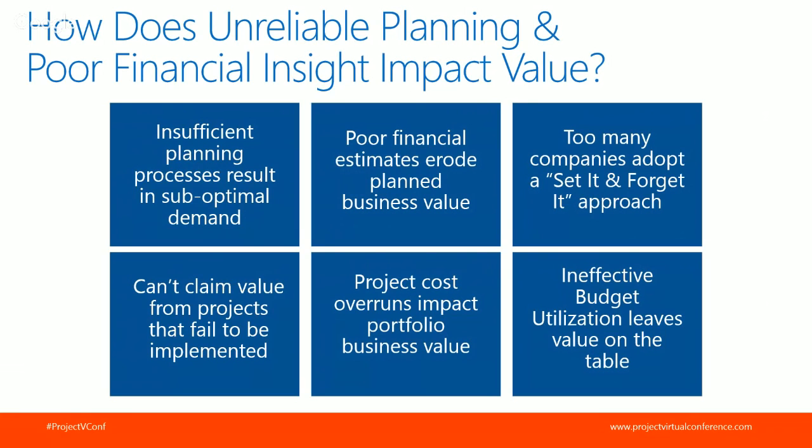One of the surprising things we found when conducting this research around the 46% was the impact of budget utilization. We found that many organizations today weren't able to spend all their budget during the given fiscal year. Could be for a variety of reasons. Resource shortfalls, simply meaning projects weren't kicked off when they were supposed to be, unplanned carryovers, projects that unexpectedly slip from one fiscal year to the next.